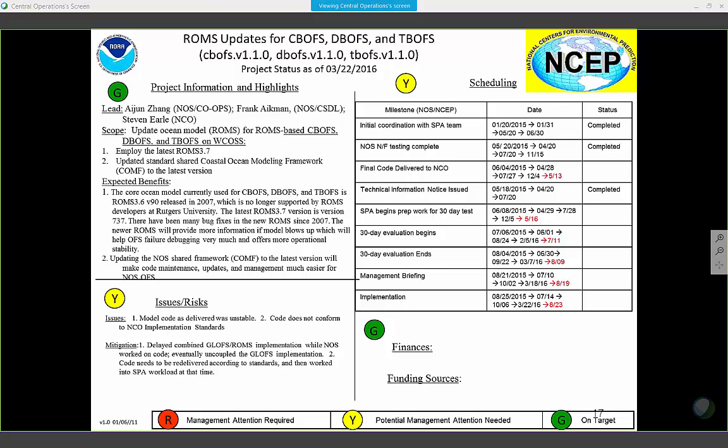Partially. Definitely partially. If that same spa picks it up when it comes back in, there will be a familiarity there. It should go faster. If they don't, it was. The other thing was the spa worked with them a lot to rework a lot of this because it was much more fractured than it needed to be, given how similar all these codes are. So I think that was beneficial work.